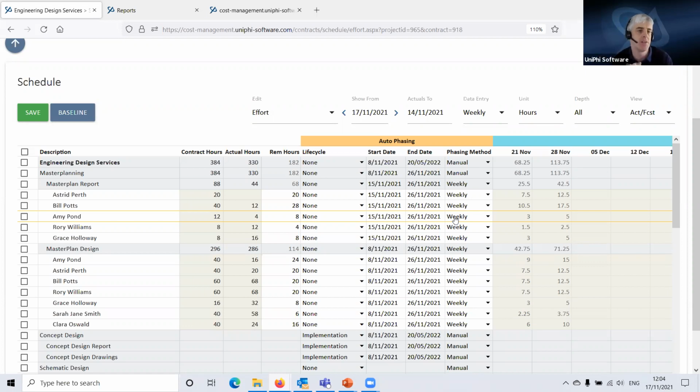Through those discussions that have come out of what's happened in their timesheets, my collaboration with them through the deliverables comments, plus their feedback of the hours they're putting in against their remaining hours, the client in meetings is asking for more scope, more stuff to be done over and above what we said we would do originally. And they have included those hours in this estimate. In fact, in some of their actual hours to date, they've done work on these changes to the scope. So I'm looking at this, and our actual work towards our original master plan report and master plan design is well progressed and going well.